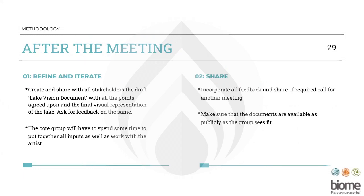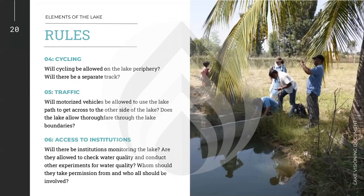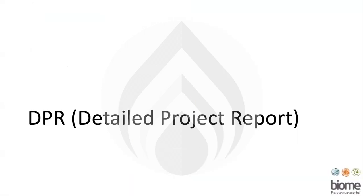After the meeting, make sure a smaller group can look at the documents, refine and iterate, take responsibility for the vision, share it continuously, and incorporate feedback. If possible, have subsequent meetings to get more or less agreement, and make sure all disagreements are documented. Rules are important — will there be pets allowed at the lake? What will the timings be? The municipal authority imposes their own timings too, so there are some rules you must adhere to, but there are some choices you can make. For example, are you going to allow cycling? Will you allow institutions to come in for measurements? Once all of these rules are clear, the lake vision document becomes the input for the DPR, or the detailed project report.